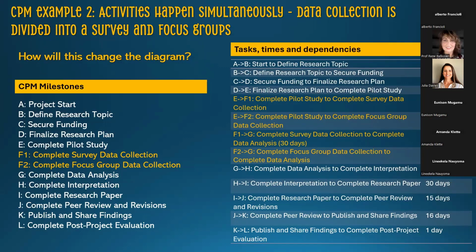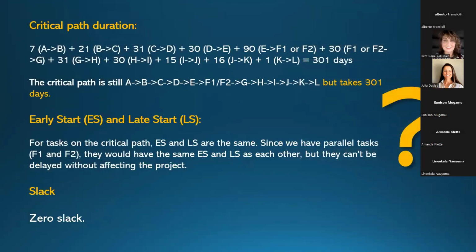So by writing up the tasks and the dependencies and seeing that it takes me 333 days, then looking at what can happen at the same time, allocating the days to the different activities in yellow based on what can happen at the same time, that brings down, look at this, isn't this fantastic? This brings it down to 301 days.